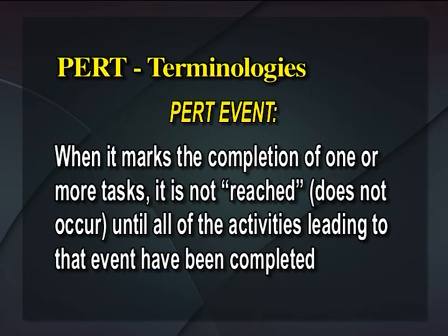When it marks the completion of one or more tasks, it does not reach, that is, does not occur until all of the activities leading to that event have been completed.